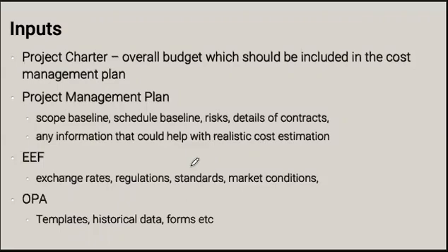Then project management plan will provide documents like scope baseline or the time baseline, as well as risks associated with not managing or not meeting the cost of the project. We're going to see some details of any contracts with the customers or suppliers, any constraints on the cost regarding materials or orders and so on. So anything that project management plan contains that could affect how we manage the cost in the project should be included as an input into this process.